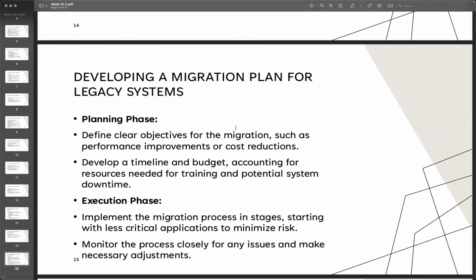Then after the assessment, we need to start the planning. So there's a planning phase. We need to have a clear objective for the migration, such as performance improvements and cost reductions. We need to care about that, and then we need to have a timeline and budget, accounting for the resources, the need for training, and potential system downtime. So all of this we need to be well prepared for in the planning phase.